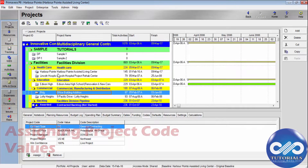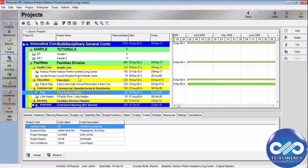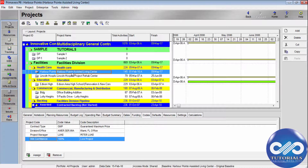Now let's see how to assign project code values to the projects. In the Projects window, select a project — I am selecting this one. On the Details tab, go to the Codes tab, then click Assign. This project has been assigned these four codes.